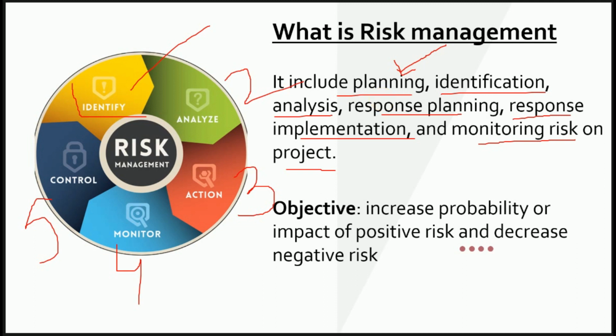Accordingly we identify our project risks. Once we have the list of risks, we put it into analysis through qualitative and quantitative risk analysis. Those risks after analysis come into planning.